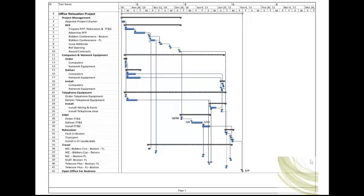Alternatively, if the telephone vendor worked 10 hours a day, the work could be completed in five days for a total of 180 paid man hours accounting for overtime. The extra 12 man hours cost the PM $840 and results in no change to the install telephone timeline. A good option, but the project is still slightly past the deadline.